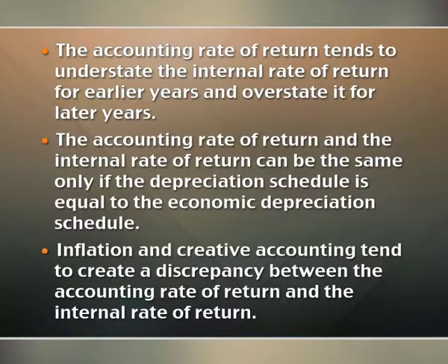However, if the accounting rate of return is calculated for each year using the expected or actual net income, the following generalizations may be made. The accounting rate of return tends to understate the internal rate of return for earlier years and overstate it for later years. The accounting rate of return and the internal rate of return can be the same only if the depreciation schedule is equal to the economic depreciation schedule. Inflation and creative accounting tend to create a discrepancy between the accounting rate of return and the internal rate of return.